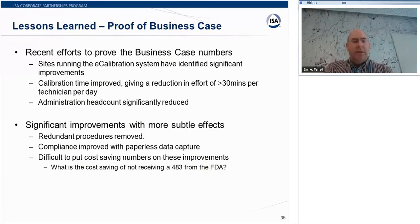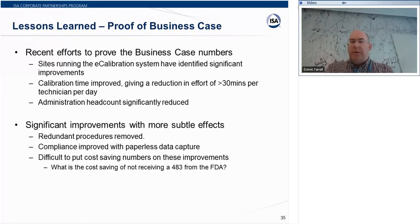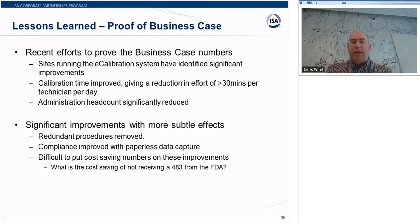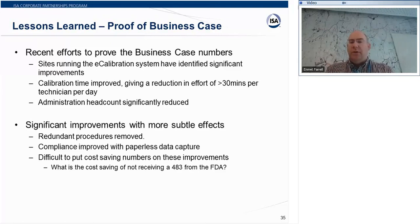Having implemented the system, what lessons did we learn and what takeaways did we get? We had to keep redefining and proving our business case — did we get what we wanted out of it, does it make business sense? We have seen significant improvements, borne out by surveys from sites that have come onboard. We've seen reduction in calibration tool time, and administration headcount has been significantly reduced. Think of the amount of people involved in handling 10,000 calibration certificates — as you move to a paperless and integrated system, that administration overhead goes away. We've also seen significant productivity gains from our technicians. The administration headcount can be redeployed to other tasks. There is also the difficult-to-quantify benefit of having a more compliant system — I call it the 'being able to sleep at night' factor. We're doing the right thing, improving compliance, and reducing our risk from regulatory inspections.